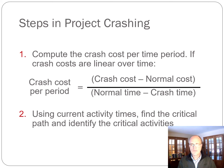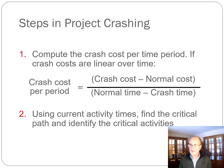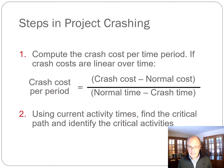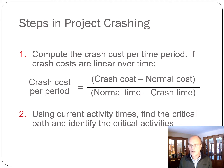The next key point is: you only crash activities that are on the critical path. Using current activity times, find the critical path and identify the critical activities. Those are the ones you want to shorten. If you shorten an activity that's not on the critical path, you may spend more money and make that individual activity shorter, but you do not affect the whole project duration.